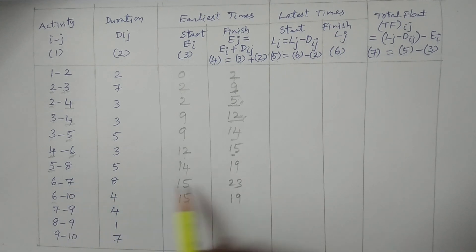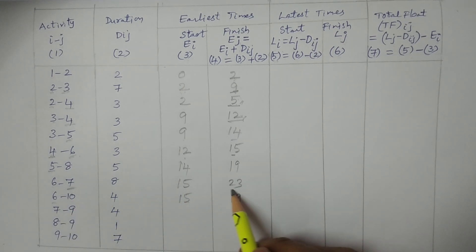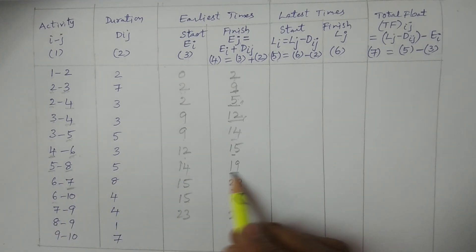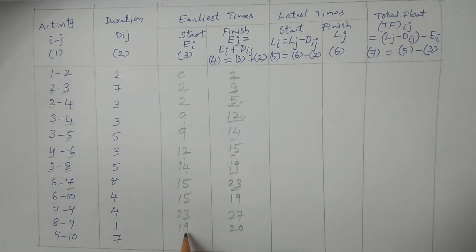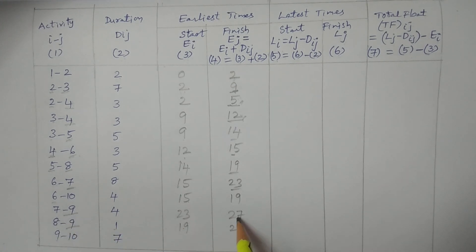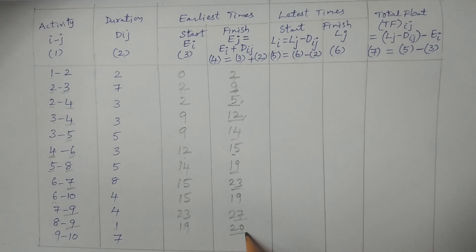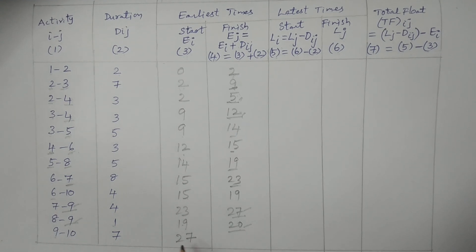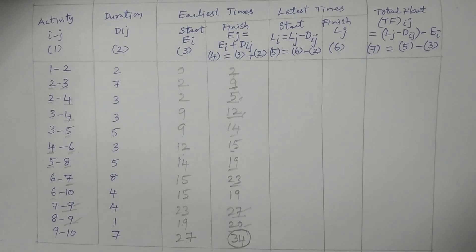E7: only one value from 6 to 7, so E7 equals 23. 23 plus 4 equals 27. For event 8, from 5 to 8: value 19. 19 plus 1 equals 20. For event 9, from 7 to 9 and 8 to 9, values are 27 and 20. Take the maximum: 27. Then 27 plus 7 equals 34. This is the minimum total duration of the project — 34 days.